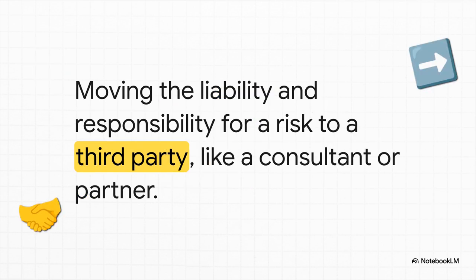Your third option is to transfer the risk. This doesn't make the risk vanish, but it shifts the consequences to someone else. The classic example here is buying insurance, but it could also mean hiring a specialist firm to handle a particularly tricky part of the project that's outside your team's expertise. You're essentially paying someone else to worry about it.